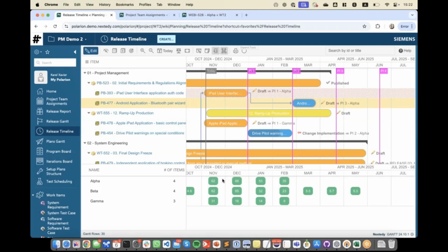And here on the bottom, instead of seeing how the people are utilized or overutilized, we see the actual teams. Again, it calculates the team capacity available, allocated, and the actual capacity based on the people being assigned over the given timeline.